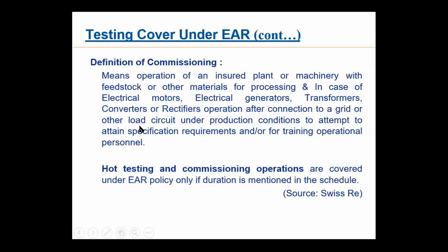Tested and commissioned. Cold testing, hot testing is done. First of all, cold testing is done during your construction stage, your erection stage, before the hot testing starts. Then hot testing is done. You put the machine on load, connect with grid, and if you are successful in running your generator and all that, that means your hot testing is over and the plant is commissioned.